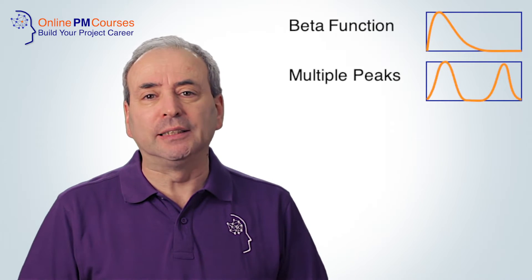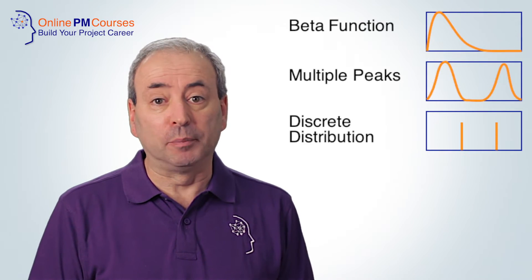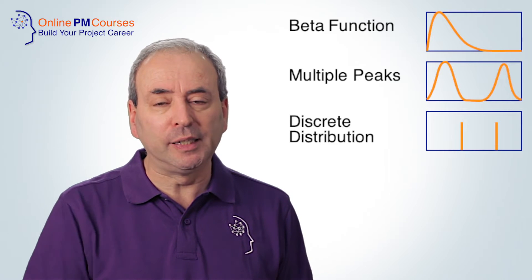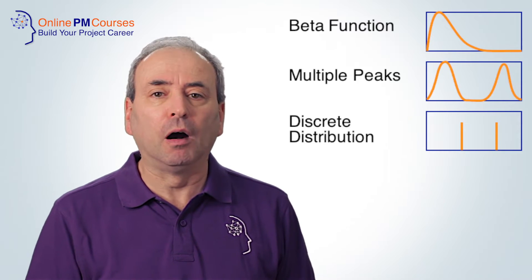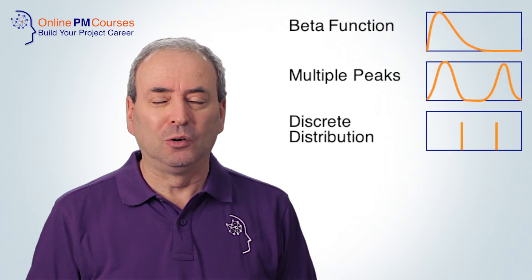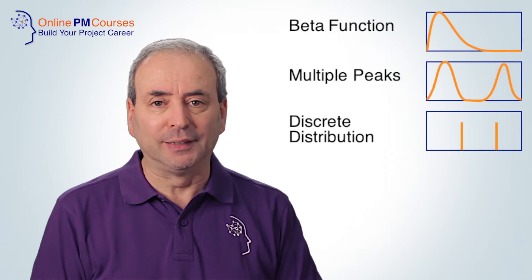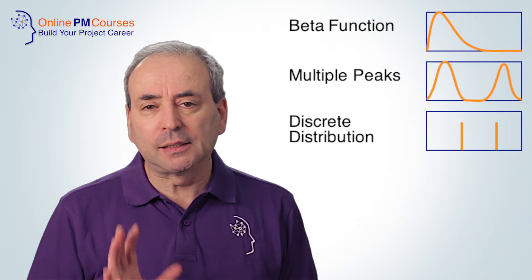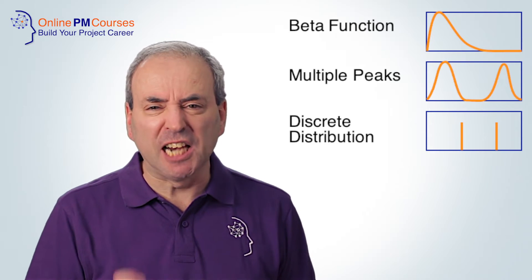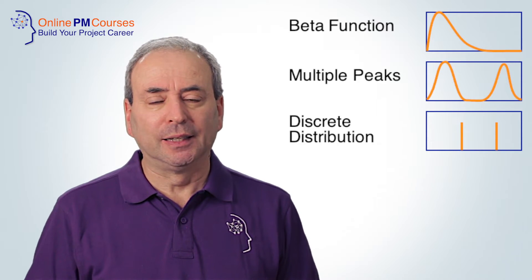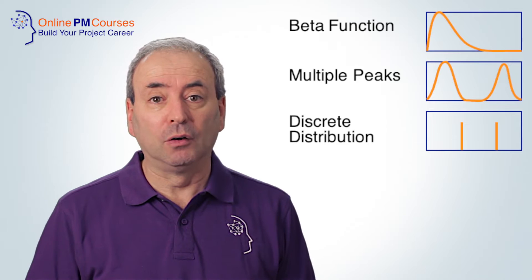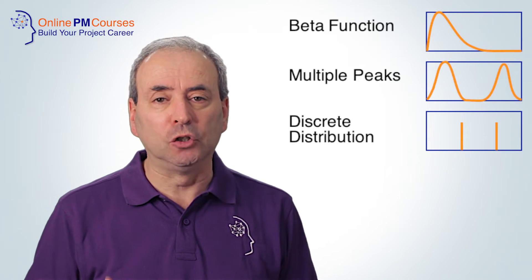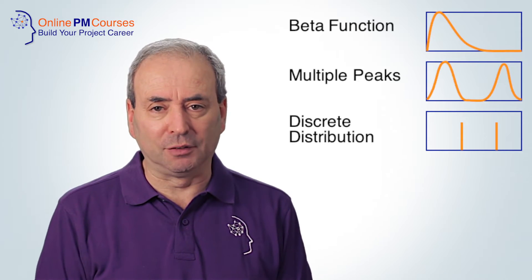A discrete distribution says that we could be delayed, for example, by two days or three days, but not by two and a half or three and a half, or even one and a half or one day. And sometimes activities are genuinely like this — certain levels of delay or early performance are just not possible given the nature of the task.